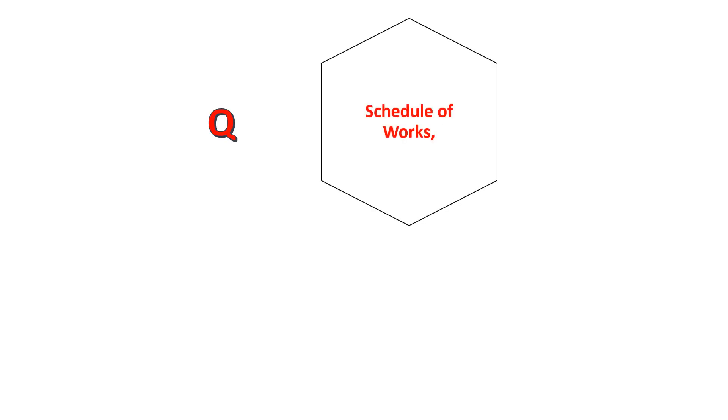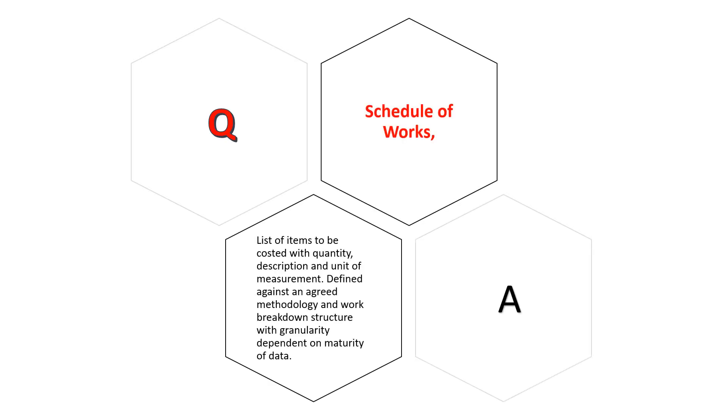Schedule of works: List of items to be costed with quantity, description, and unit of measurement. Defined against an agreed methodology and work breakdown structure with granularity dependent on maturity of data.